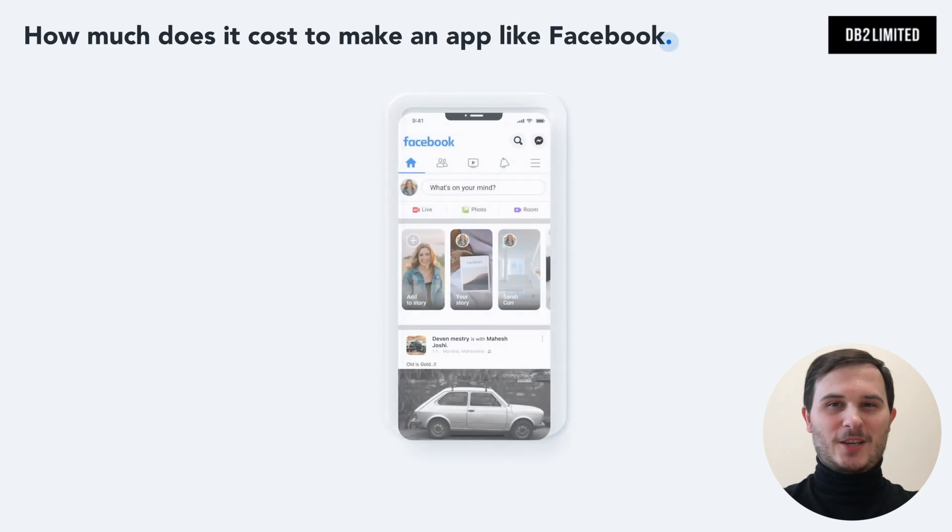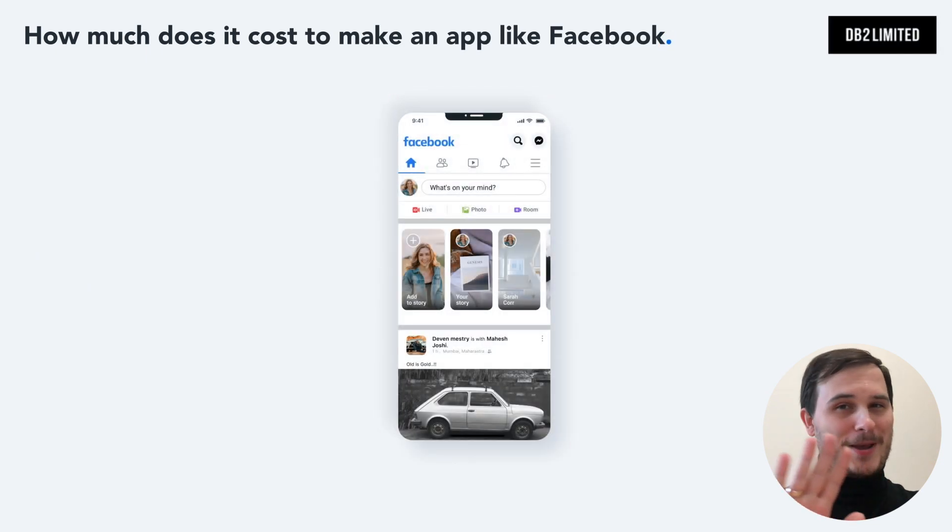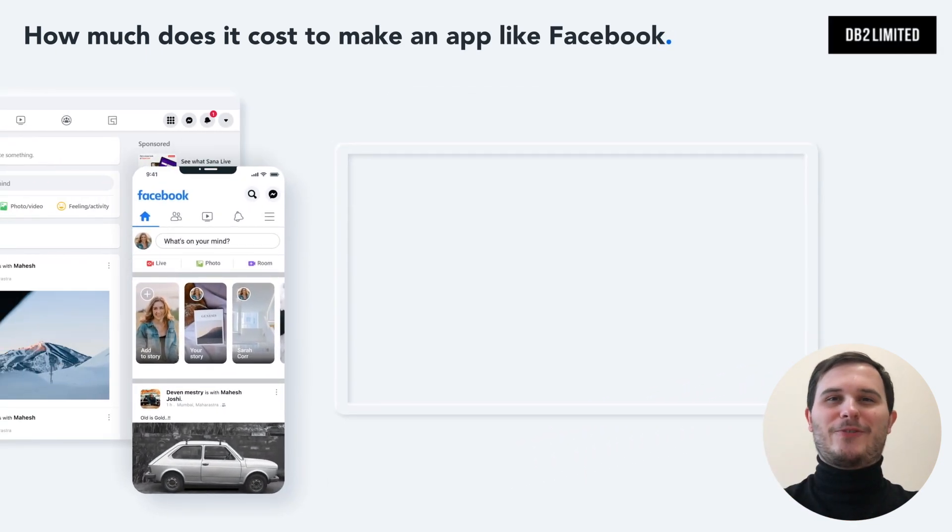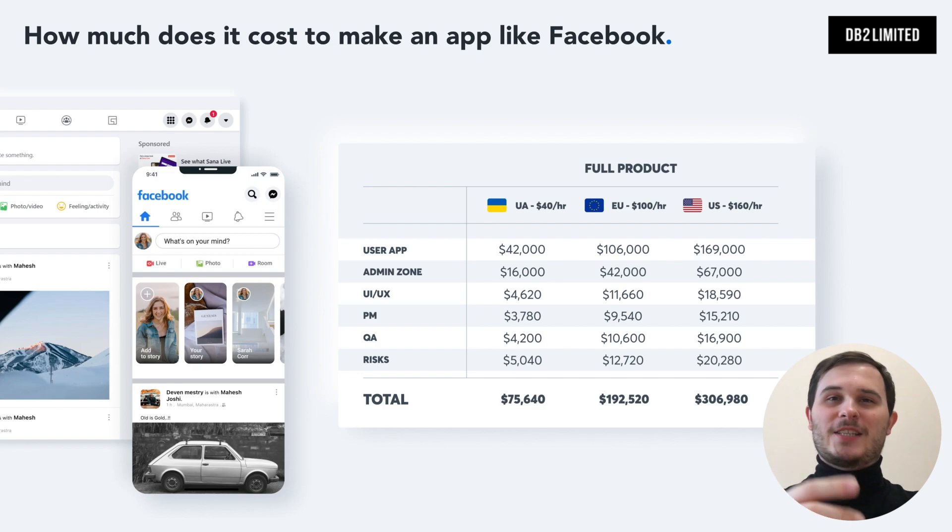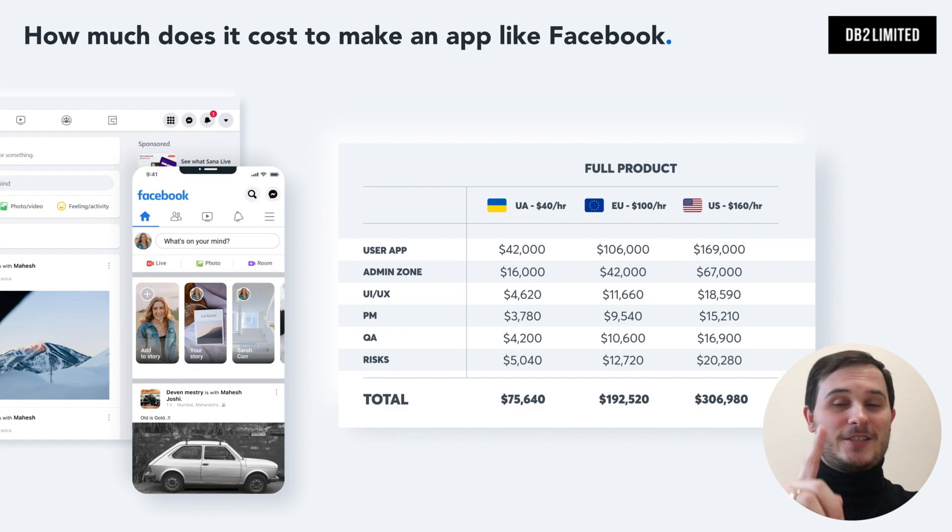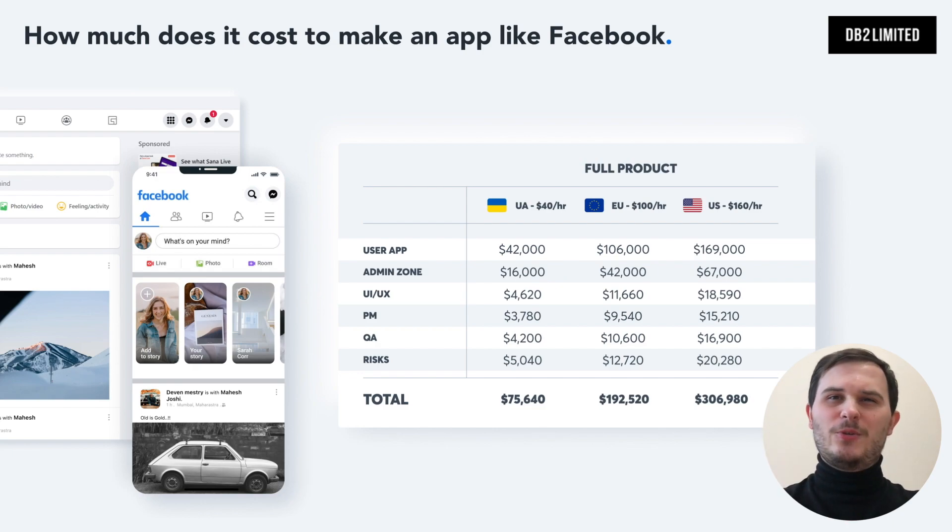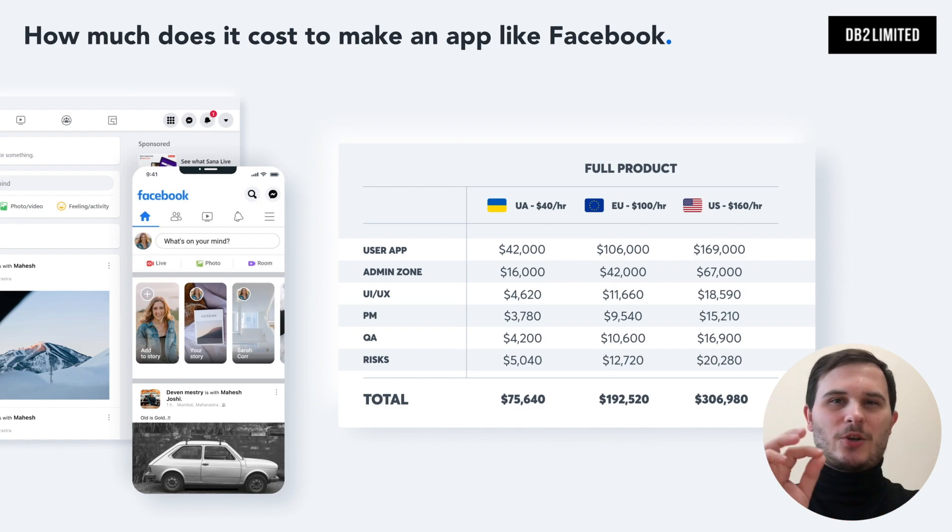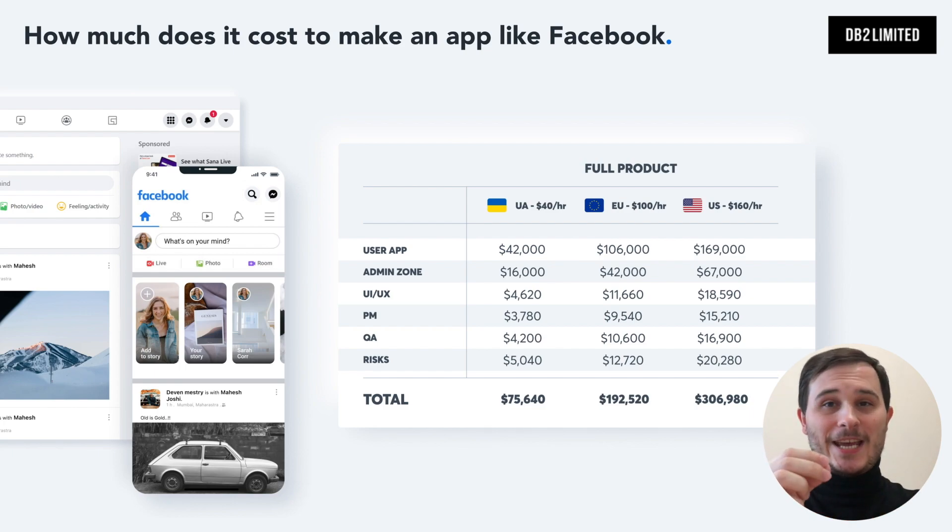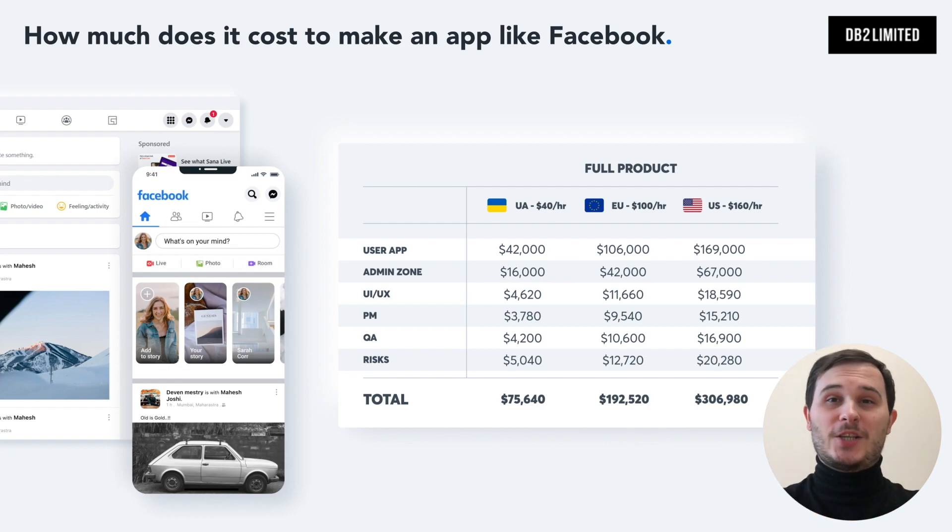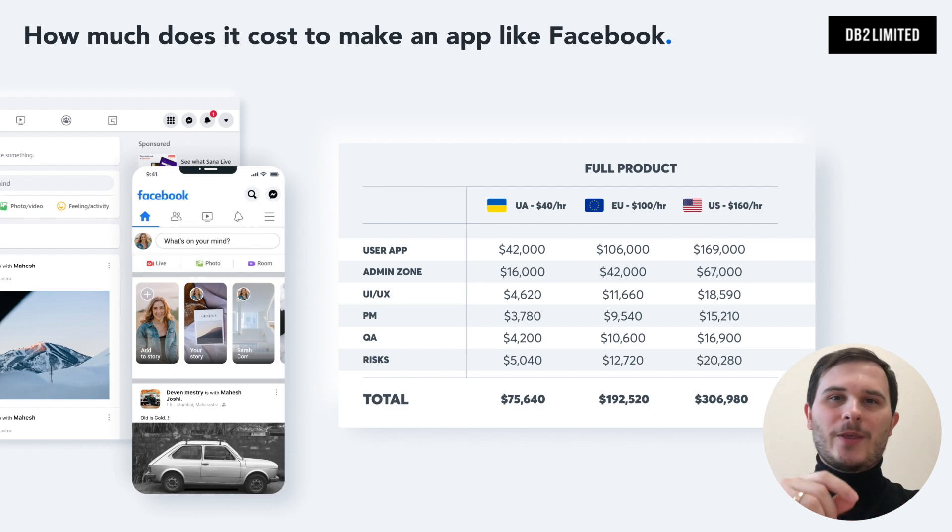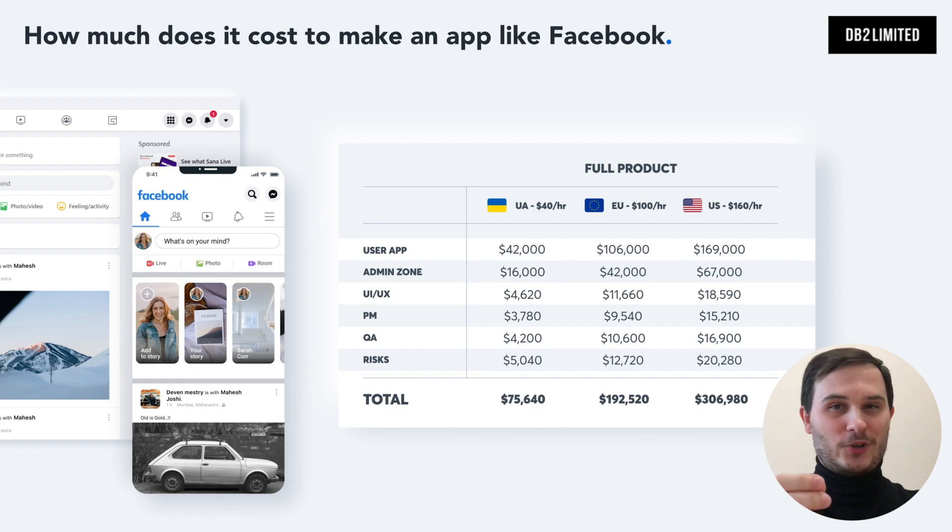When it comes to pricing quotes, many people totally forget to include quality assurance, bug fixing, project management, maintenance and risks. Also, you need to include the development costs of your unique idea. That one can be hard to estimate without understanding what you want to build. So, in this video I'll work through the core functionality.